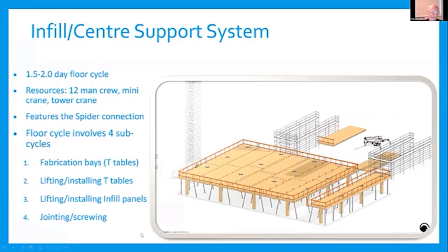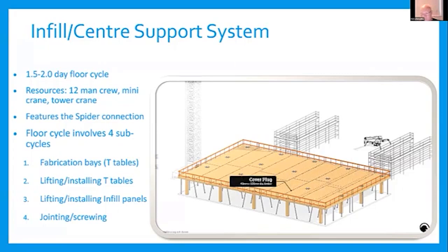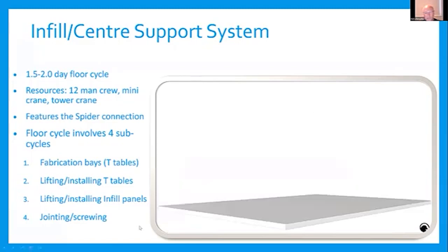You can see the connectors going in. They take a lot of time, and they can be on our critical path. So looking at the number of connectors is actually a very important thing if you're looking at time and process.